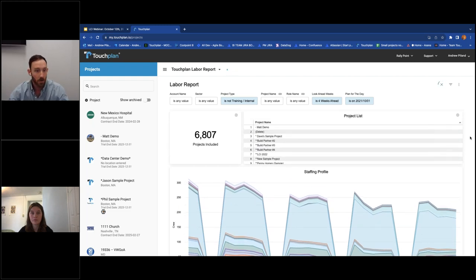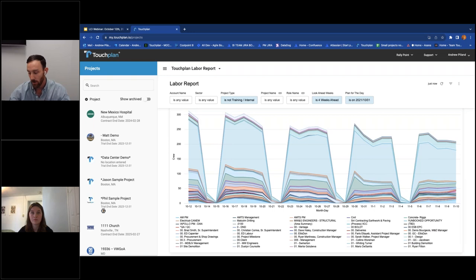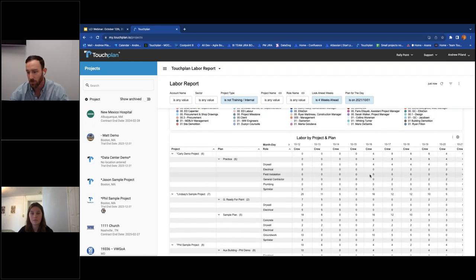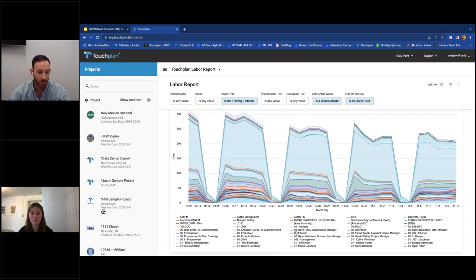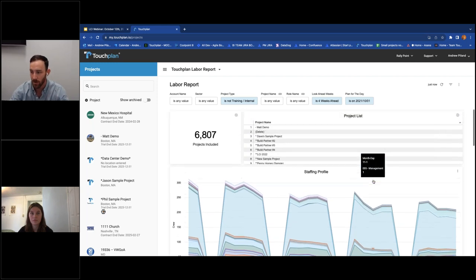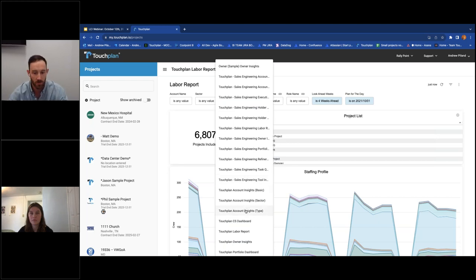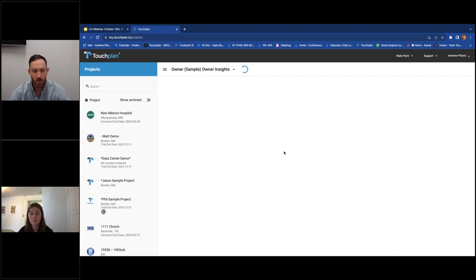At the general contractor company level, we have something called Account Insights, where across multiple accounts you can see all of that data from your week-to-week planning pulled into one place. Trade partner customers using TouchPlan at an enterprise level use a dashboard called Labor Report, where they're forecasting crew size requirements out over several jobs. For a superintendent at a general contractor, you can start making site logistics decisions based on your projected manpower curve — do you need portable johns, more break space? You can't do that with sticky notes.